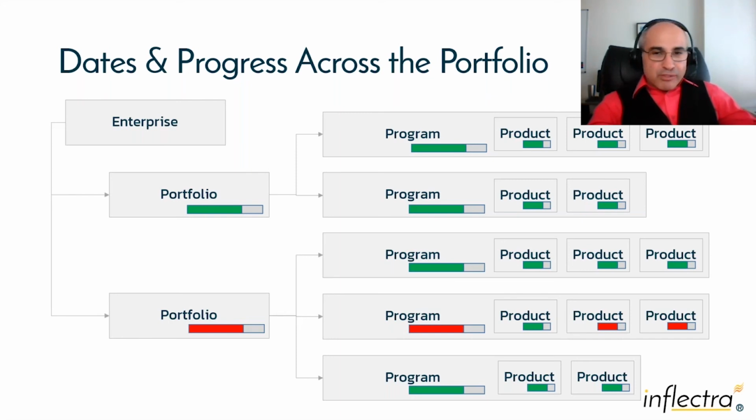And that single measure of doneness of progress is based on requirements completion, because we realize that for a requirement to be fully done, developed and tested and then marked as closed and completed, it has to have gone through all the testing, and also all the tasks need to be completed. So in fact, it encapsulates all the other metrics together. So we've now introduced this new metric, percentage complete, based on requirements, and we now have it at the product level. We also roll it up to the program level, and to the portfolio level, and to the enterprise level.